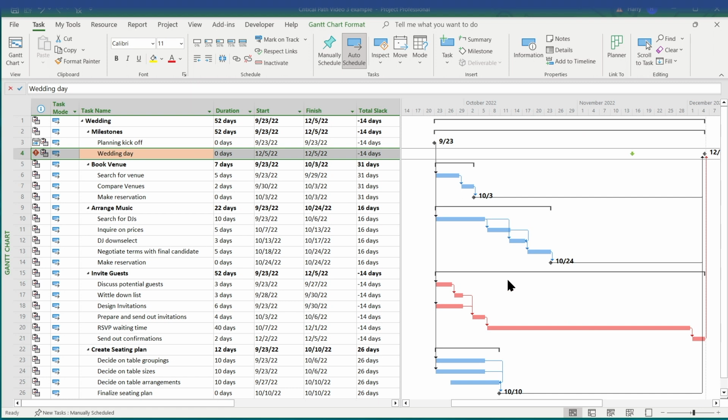Now that we have our deadline applied, what changes have occurred? Firstly, notice the light diamond that has appeared in the Gantt chart. This diamond represents the deadline you just added. Notice that we are late, we are further to the right in the Gantt chart. The addition of this constraint also introduces us to the idea of negative slack. Taking that idea further, any schedule that does not have any constraints placed on it will have a critical path of 0 days. Only by introducing a deadline that we must hit can we start being late, which makes sense.